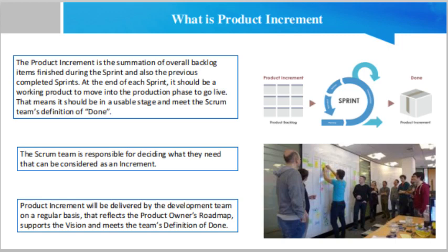In Scrum, we generally work on one feature at a time, but not in a phase. So, we will be creating a valuable product increment by the end of the sprint, and that increment should be integrated and tested with all the earlier developed features, or else it is not considered done.